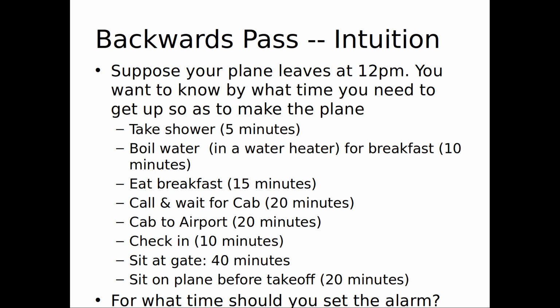Now here the reasoning is a little bit different, because if you have to be, for example, eating breakfast by a certain amount of time for you to catch the plane, and you have to call and wait for the cab by a certain amount of time, you're going to need to take the minimum of the latest times you could start those without missing the plane, in order to get the time you have to start either of them. Okay, so there's actually a minimum here.